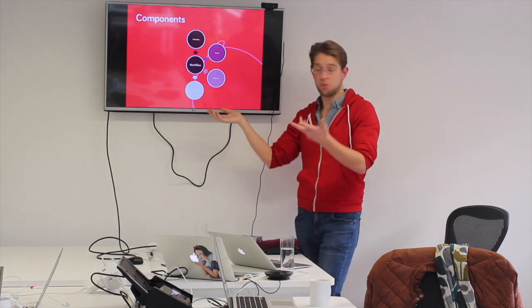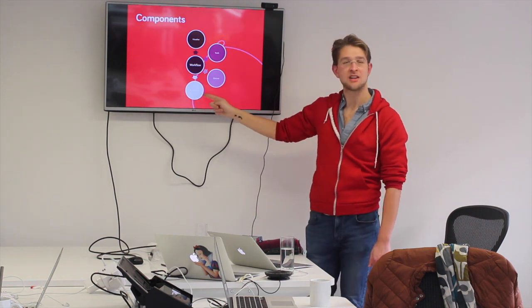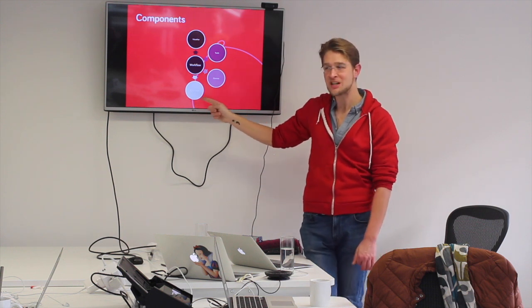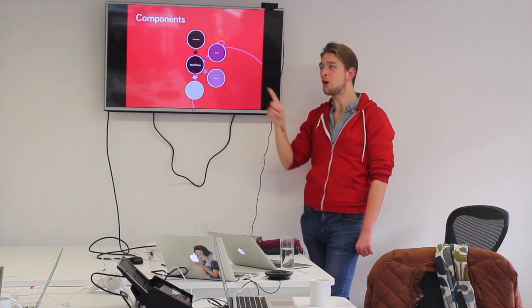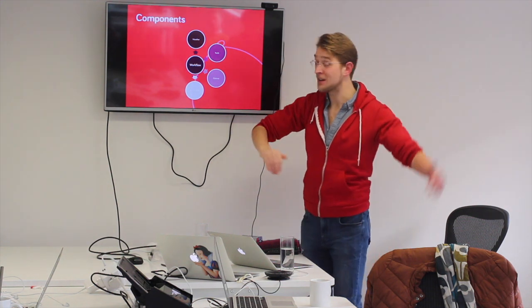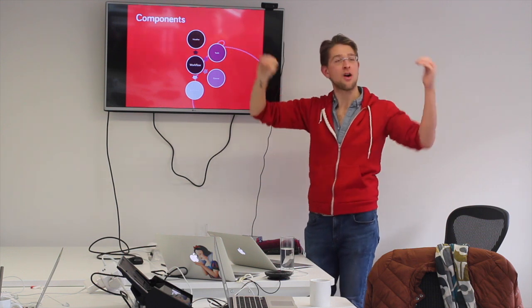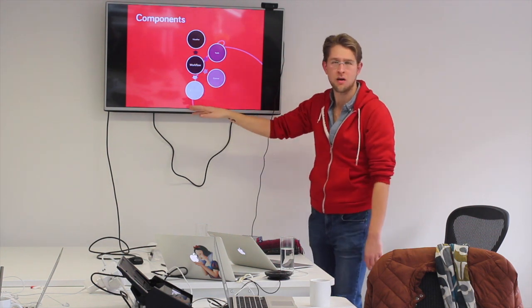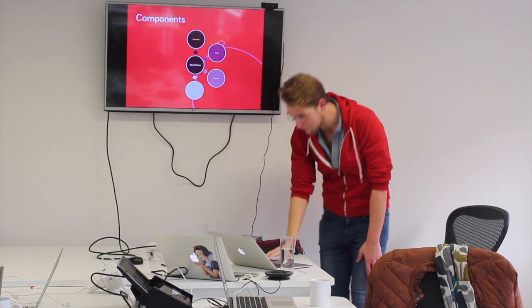So for instance, one of the truths is that every manufacturing process must actually have a bottleneck. Right? So your aim is not to remove every bottleneck, your aim is to identify where the bottleneck is and to balance the capacity of the bottleneck to market demand. Then the non-bottleneck parts that either feed into the bottleneck or feed out of it have to be managed so that their flow matches the flow that you need through the bottleneck. There's this stuff called drum, buffer, rope. But there's an interesting bit of learning to do there and to apply.